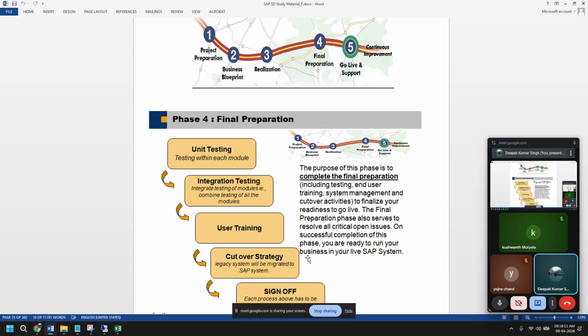You will prepare, because there are a few data that you can migrate before, right? Let's say customer master. You don't have to wait for the cutover date. You can migrate it initially. Let them use the legacy. That's not a problem. You copy the data from the legacy and then you start uploading in the SAP. That's why you can do it in parallel.